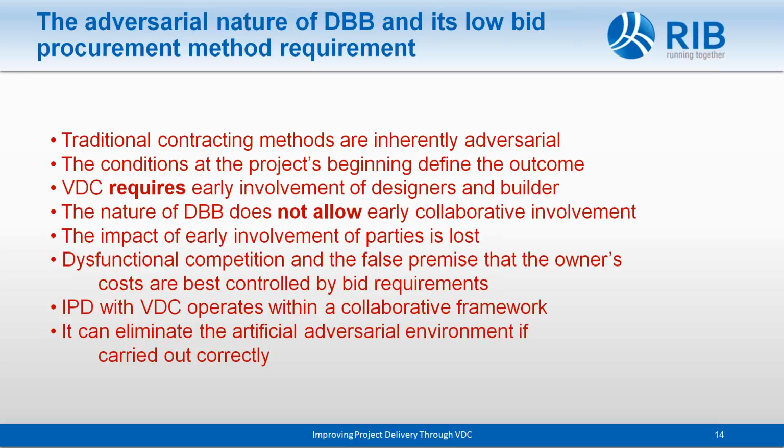Subcontractors have not yet been chosen because the contractor has not been selected, because the bids are not put out yet. Yet the design has gone on. Okay. The term collaboration allows input from all these different parties on the project. Okay. The design-bid-build method, though, is inherently adversarial. Okay. And this does not allow for a collaborative environment.